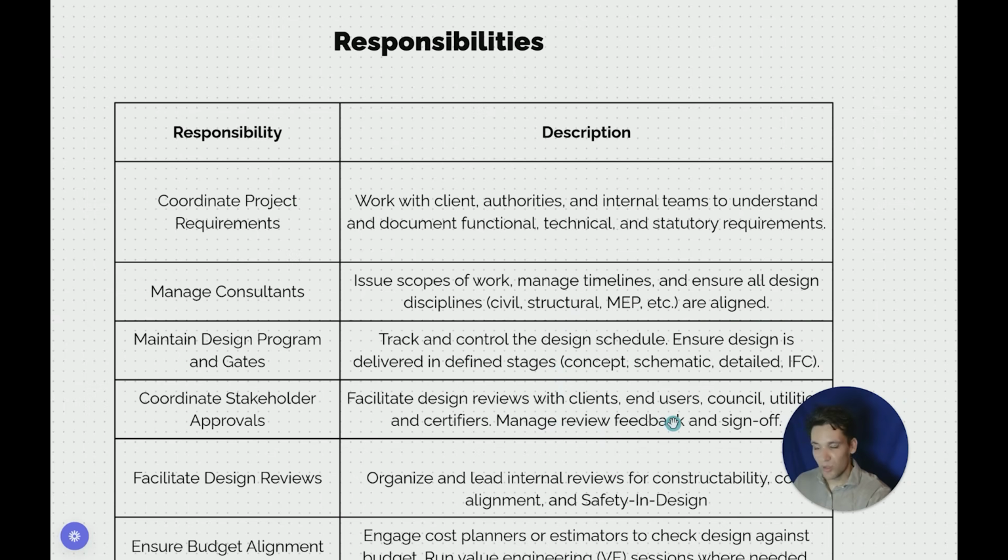They need to maintain the design program, so they need to ensure the design is developed on time, and it goes through specific design gates, which I'll talk about a little bit more in a second, but basically they're tracking and controlling the design schedule, ensuring the design is delivered in defined phases, and that the IFC date meets the IFC date in the program, so it's ready to start construction.